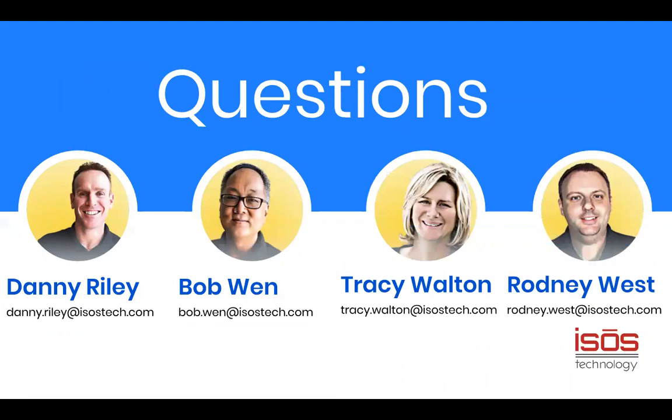What can you use to script that out? Okay, so I'll take that because I'm actually doing this for a client that ISOS has. It really depends on what your inputs to the WSJF are going to be. Those not only your user business value, but also time criticality, RROE, risk reduction, opportunity enablement, as well as your job size. Numbers work. You can just put the numbers there.